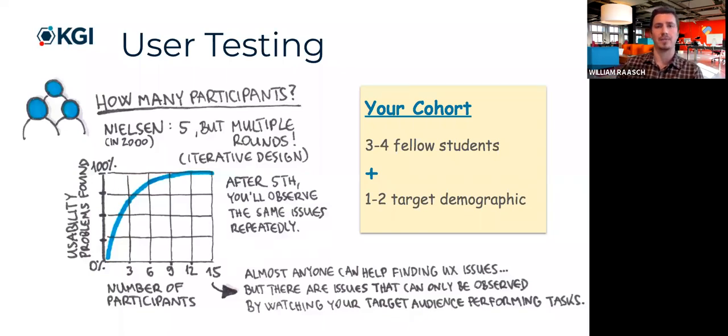So it's better, going along the same lines, to break this into small chunks and keep giving the customer new things to assess for us, as opposed to doing one huge chunk that you're then going to test on like 100 users. Here it's keep it small, keep it short, keep rolling out new features. That's, again, part of the Agile methodology: break it down as much as possible so that you can be in close contact with the user and you don't end up making a huge investment for something that they might not even want.